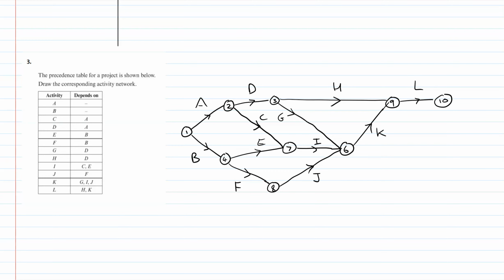not always easy, because it might be that you put C above D, because alphabetically you'd probably write C then D like this. But if you just have a little quick scan ahead, you can notice that C goes into I. D doesn't go anywhere else. D goes into its own things. H and G, so you're just going to want H and G coming out from D.